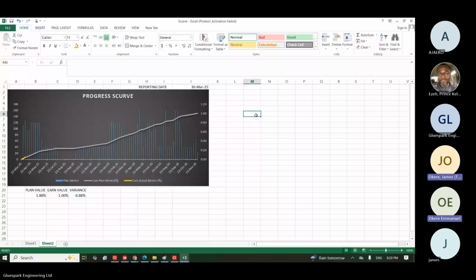Okay. I get that. So in maintenance, whenever they are done maintaining any system, any equipment, you will go for the pre-startup safety review. So for the equipment, you will use what we call a punch list: the items that need to be available before that equipment can be powered on. It's just like house wiring. You are done wiring the house. Before you can power that house, you need to do a pre-startup. Which means somebody will come with a punch list, a list of items.